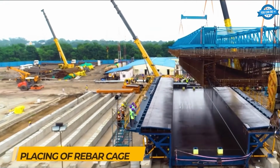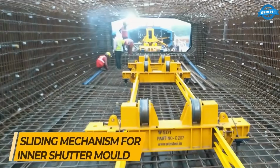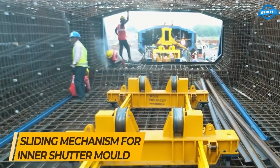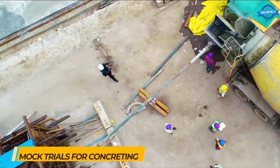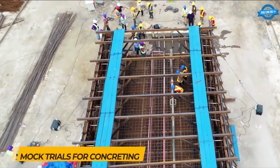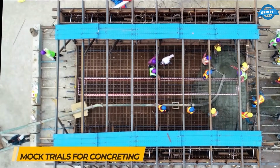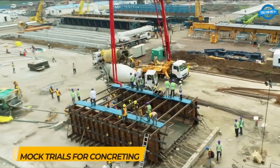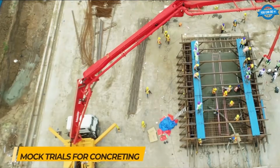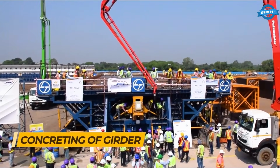Think about that for a second. A concrete object heavier than a fully loaded 747, rolling out the door every 3 or 4 hours, every day, for years. That is not construction pace. That is manufacturing pace, only heavier. The yard has its own batching plant, its own casting beds, its own molds, and its own gantry cranes just for shuffling things around inside.